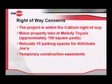A couple of the questions that have come up have to do with right-of-way concerns. We do want to emphasize that this project is within our right-of-way. There are just a couple slivers of property that we had to work with the owners on. Part of it is at the Toyota dealership. I believe it's 160 square feet. We also are going to have to relocate, but we will put back, once the project is complete, parking spaces at Artichoke Joe's. There will additionally be some temporary construction impacts and easements required that may require things like local traffic only or one-way traffic only on First Ave for a couple periods of time.